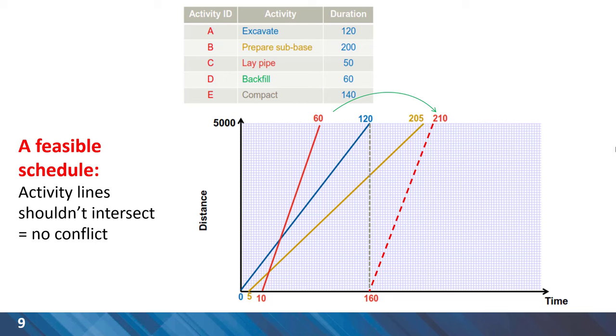For laying pipe, we consider five days of buffer for the start. So starting at day 10, duration of 50 gives us an early finish time of 60. However, we can see that activity C can catch up with the other two activities and therefore we have the intersection of lines and this is an indication of conflict between activities.